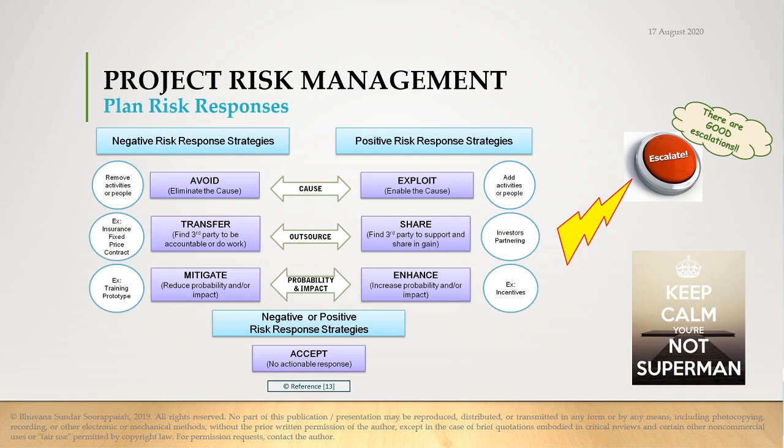Another thing, imagine the same thing, you are running your 2-year project. In 6 months from now, you will start the testing activities for which you need some equipment. What is the chance? Sometimes the cost of that equipment may increase. So sometimes you buy it in advance. So you are increasing the probability you will save some costs on the project by buying an equipment in advance.